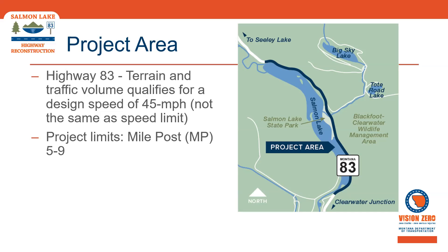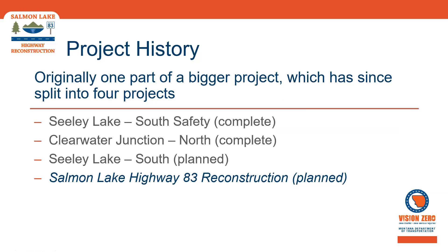A little bit of the project history: originally the Salmon Lake Highway 83 reconstruction project was going to be one project extending all the way from the Clearwater Junction at the south end to the north end of Seeley Lake. But that was a massive project and from a funding standpoint very difficult to put together all in one shot. So it was broken apart into four different projects.